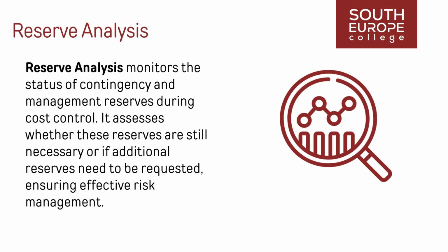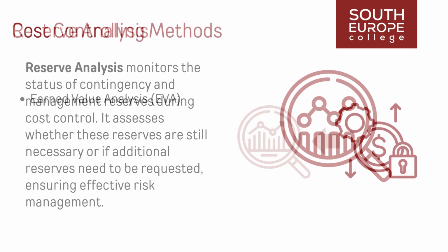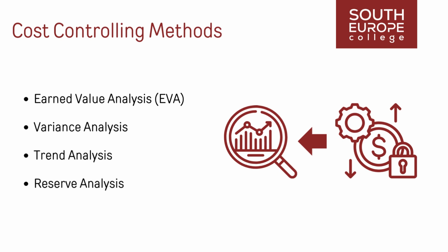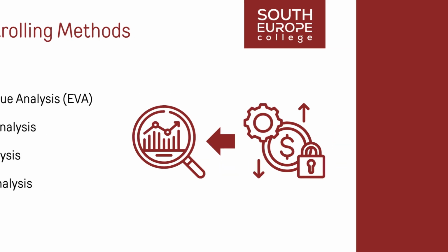Reserve analysis monitors the status of contingency and management reserves during cost control. It assesses whether these reserves are still necessary or if additional reserves need to be requested, ensuring effective risk management. These data analysis techniques provide a comprehensive understanding of project cost dynamics, enabling informed decision-making and proactive management of cost-related challenges throughout the project life cycle.